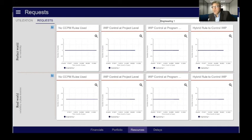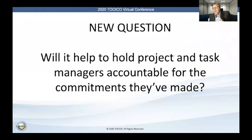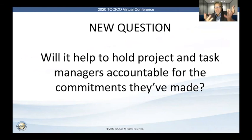You can also see the request backlog. If I'm interested, while the model is running, I can see if a specific resource ever became a bottleneck — was there at any point a substantial backlog of requests waiting for them? I can see here for Engineering Type 1 resources, there was never any backlog — so we probably have too many of those resources, and we could take some away and rerun the model to see if it impacts performance. But for Engineering Manager 2, there are substantial backlogs that can happen.